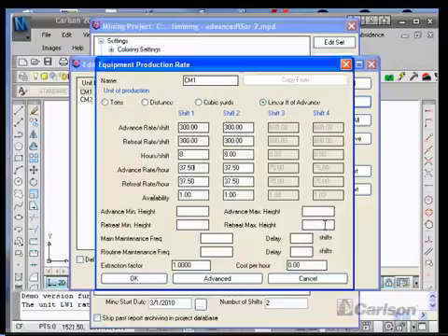There's a few places in the United States, and the Pittsburgh seam that take advantage of that. The main maintenance frequency and routine maintenance frequencies are options for allowing you to schedule downtime in the same units that you produce in. So if you want to say every 10,000 tons or 15,000 tons, you're going to take a day or shift down to do repairs, you can do that.